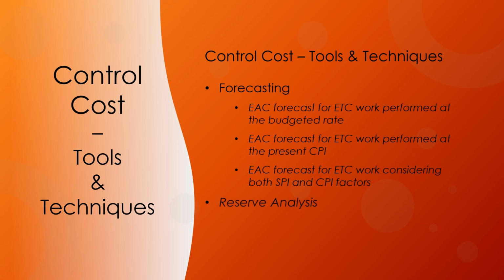During cost control, reserve analysis is used to monitor the status of contingency and management reserves for the project to determine if these reserves are still needed or if additional reserves need to be requested. As work on the project progresses, these reserves may be used as planned to cover the cost of risk responses or other contingencies. Conversely, when opportunities are captured and resulting in cost savings, funds may be added to the contingency amount or taken from the project as margin or profit.